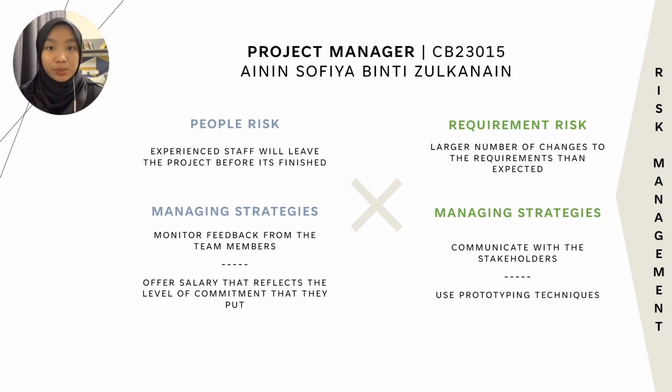The risk related to my role, which is project manager, is people risk, where the experienced staff will leave the project before it's finished. This problem can be solved by monitoring the feedback from the staff so that we can understand their problem. Next, we can also offer a salary that reflects the level of commitment they put in, so that they know that we appreciate the hard work and dedication that they give.